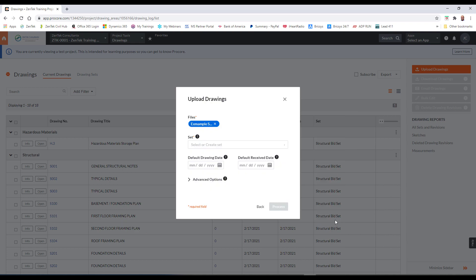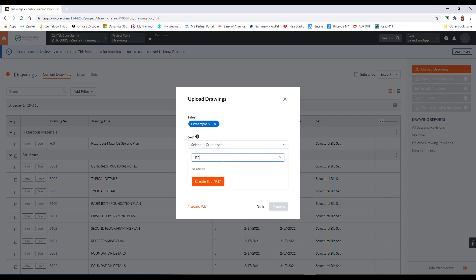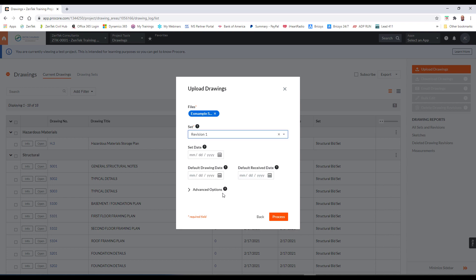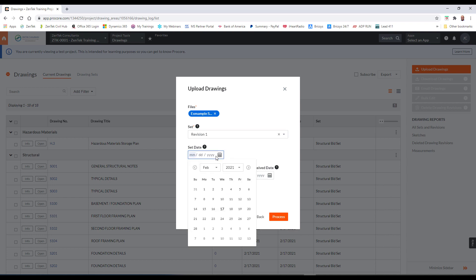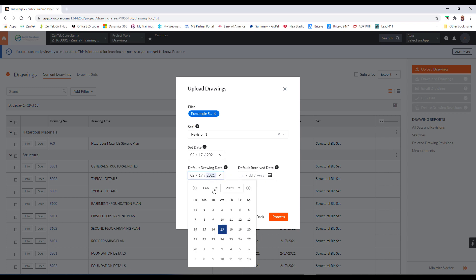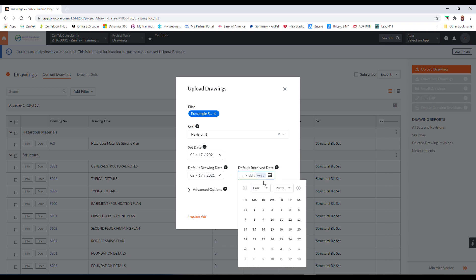Now, you notice I'm not doing much yet, but what I'm doing here is it's going to recognize that this is already an existing drawing set. So what I'm going to do here is I'm just going to create my revision one set. That's all you have to do. Just go in and type whatever it is. And it can be whatever revision number you want and you can put in your structural updates. You don't have to worry about numbering here. You're just creating another set for these. And just go ahead and say I am going to create that set. And you can go in and you can set the date that you receive the set, what the default drawing date is on the drawings.